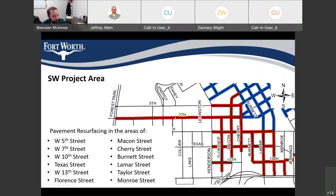For the southwest project area, pavement resurfacing will be the third phase of the resurfacing, and it will include West 5th Street, West 7th Street, West 10th Street, Texas Street, West 13th Street, Florence Street, Macoon Street, Cherry Street, Brunette Street, Lamar Street, Taylor Street, and Monroe Street.